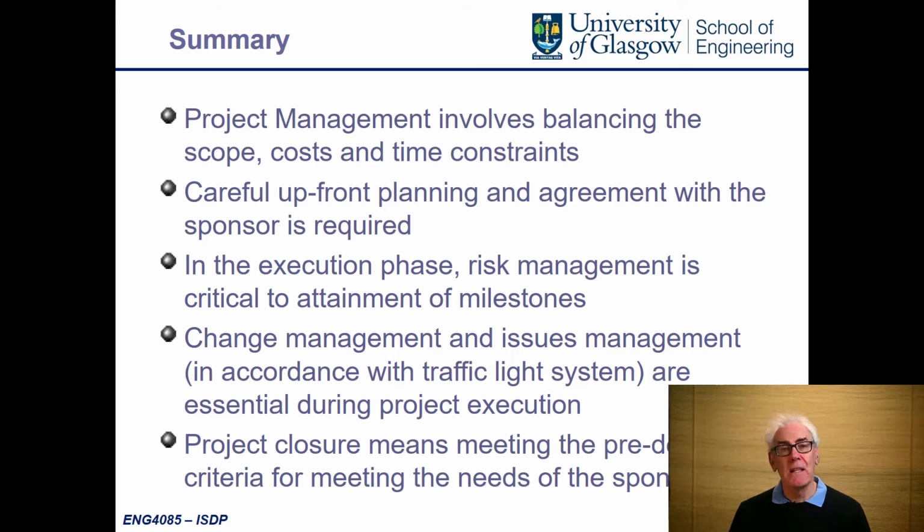changing. Risk management is critical, and I would suggest each major part of the project has its own little risk register within that. And only the major project risks get rolled up to the project risk register. Change and issue management, I would use the traffic light system. It's simple, it's easy, and everyone understands that red is bad and green is go. And finally, remember your project closure meeting.